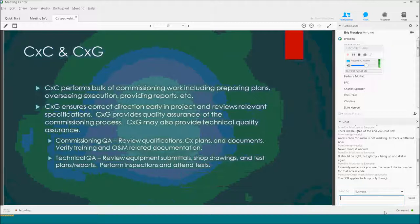The contractor's commissioning specialist performs the bulk of the commissioning work. They prepare the commissioning plan and the test plans and test scripts, oversee execution, organize the contractor's forces, and provide reports. In this scheme, the government doesn't have a third party preparing all that work. Our role is more of a quality assurance role for the commissioning process.